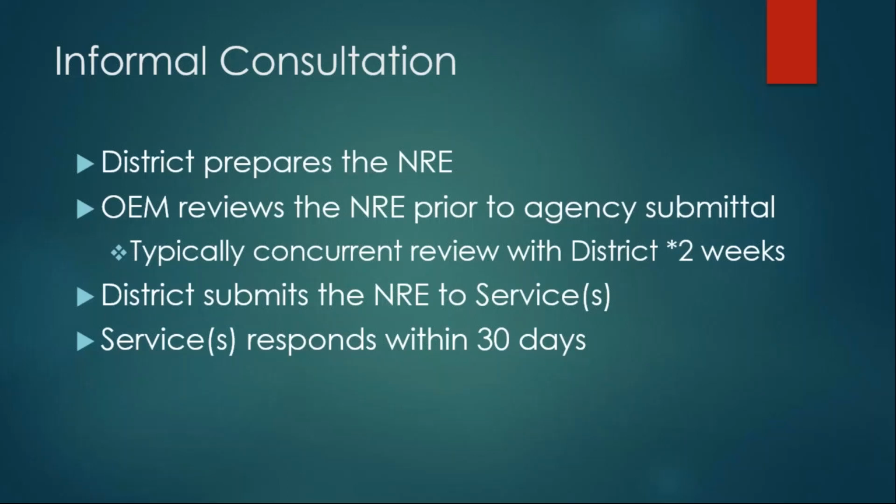The service typically responds within 30 days. For turnpike projects, if the project requires an FHWA decision, therefore resulting in a NEPA document, OEM would also review the NRE prior to agency submittal. But for those state-funded projects, we would not review the natural resources evaluation.